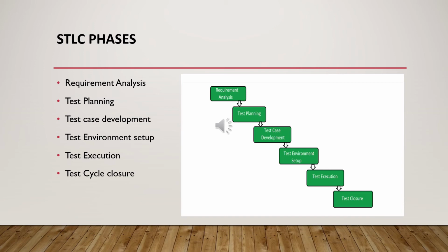So what will the testing team do? The testing team will immediately start sanity or smoke testing to ensure the major functionalities are working as expected, whether the application is stable, or whether there are any showstoppers. If there is a showstopper bug, they will mention clearly in the defect that this is stopping them from proceeding with the testing, and that testing can be resumed only when the bug has been fixed. So they will raise a critical defect, create a smoke testing cycle in ALM, and track the defect. And the next phase is the test execution phase.